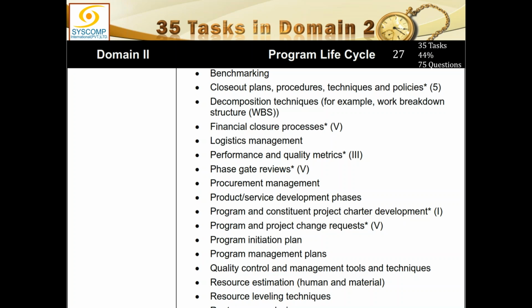For all practical purposes, as I said, the program manager is responsible for identifying all the program related activities, and he can go as deep as the phases of every project. He can suggest the phases to the project manager, but no deeper than that. He must leave it to the project manager to do all further breakdowns.